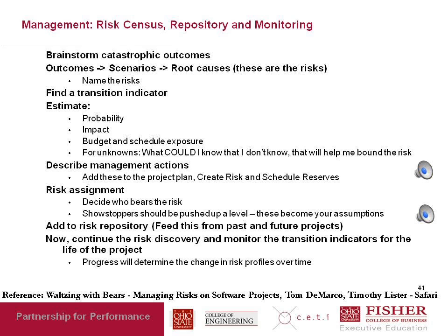Then you describe your management actions, which is how you are going to deal with it. So coming to the situation of personnel turnover, or somebody leaving, your management action might be don't put that person on the project team if you know that person is likely to leave, or else train an understudy. So whatever this person does, you have somebody working with him or her, so that even if one of them leaves, the other one is ready to take over. Things like that.